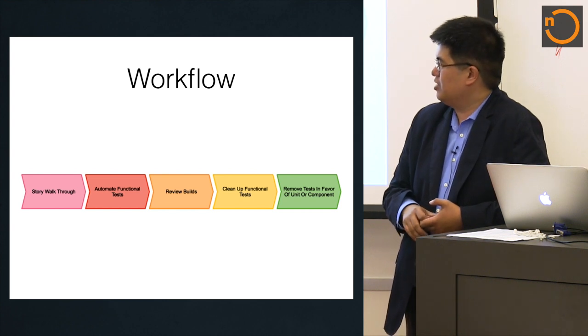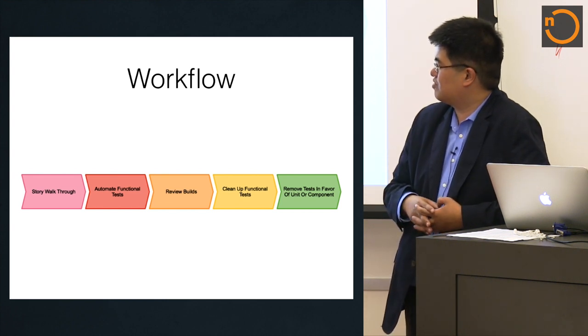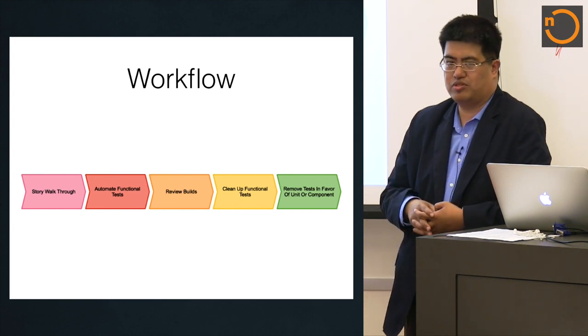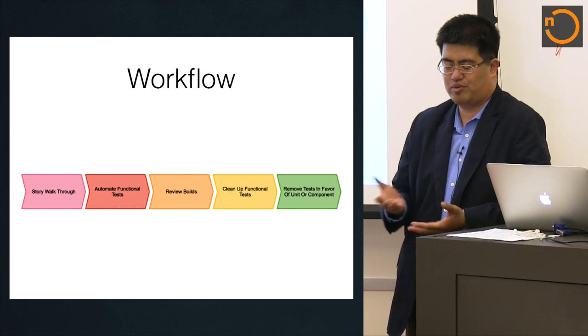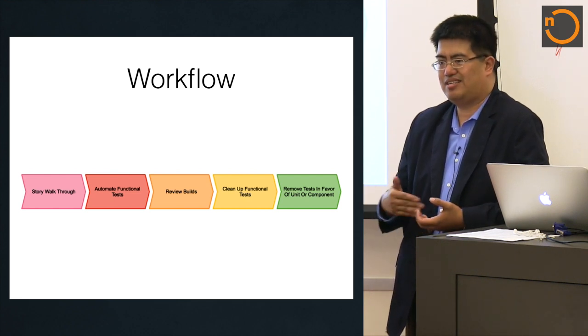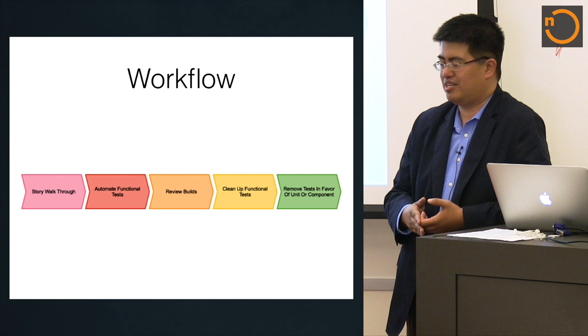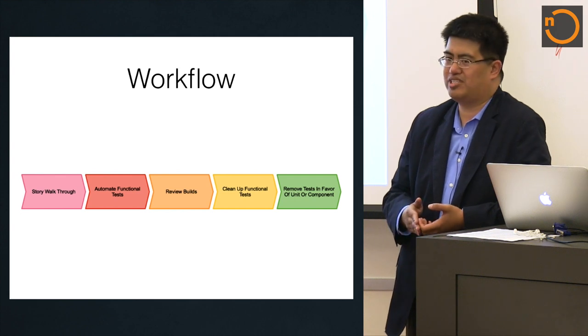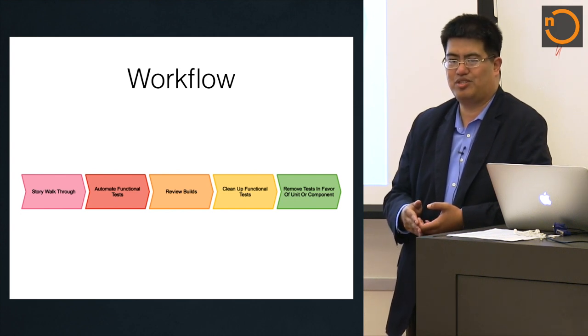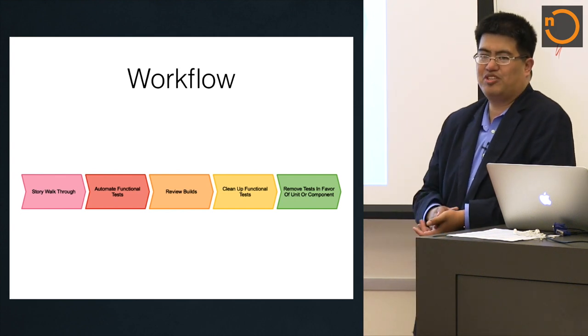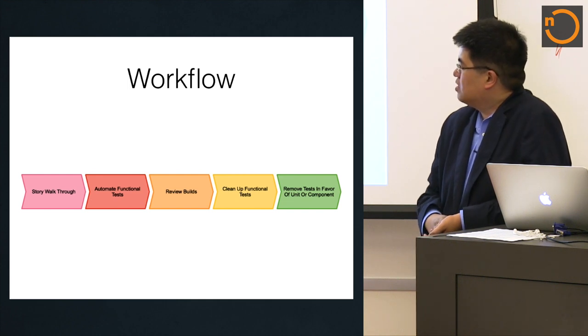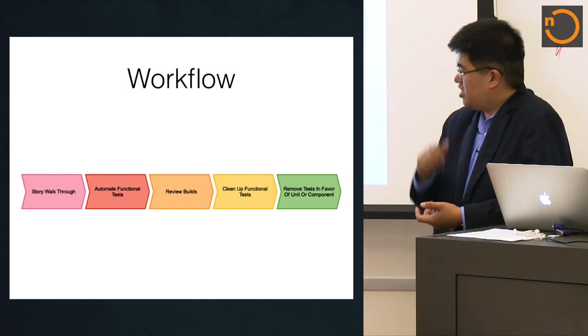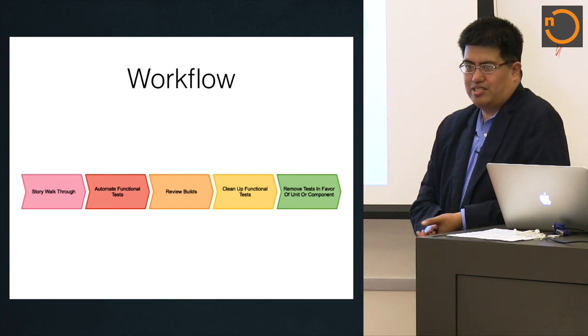For the last three months, my team has actually changed. We had a certain set of rules. Features had to be done in five days. Ultimate goal. So we did a lot of things. We actually went through this process first. We actually went through a story, walked through, looked at what we were building and say, ah, break that smaller. And we were breaking things so small that they were literally done in a day. Like if it was a database change, that became its own feature.